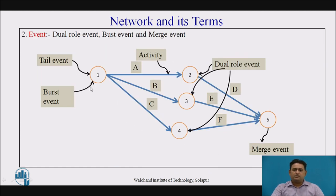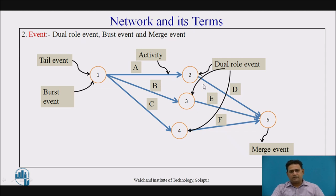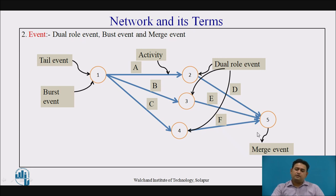Here in this network diagram, event 1 is the starting event from which all activities A, B, and C are going to start. As all activities are starting from event 1, there are all outgoing arrows, so it is known as a bursting event, and this event is also known as a tail event. Events 2, 3, and 4 are playing a dual role — they are the head event of activities A, B, and C, but at the same time they are the tail event of activities D, E, and F. Here, event 5 is where all arrows are merging, so event 5 is known as a merging event.